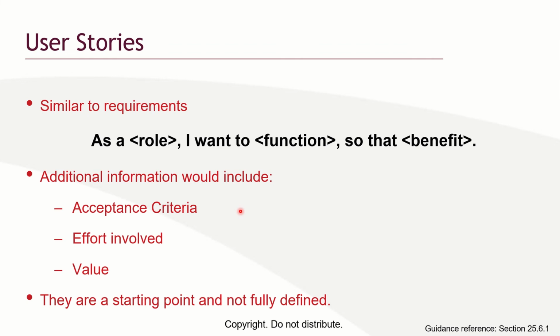you to achieve it. For example, you have a user story that says, as a customer service employee of a company, that is my function, I want to be able to send birthday greetings to all our customers so that the customers can know that we care about them.